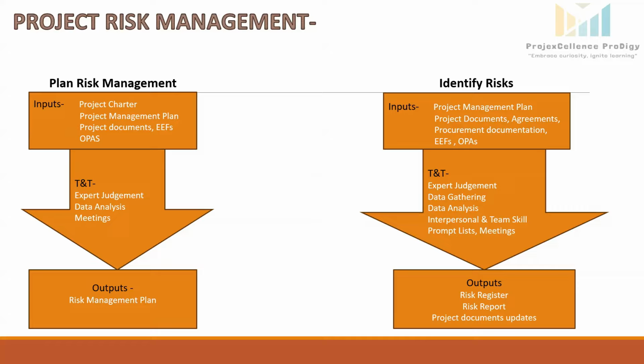Schedule management plan. It identifies uncertainties in the project schedule. For example, weather-related delays in construction or shipment of solar panels could be a risk. Cost management plan we have to refer. So we have to pinpoint the areas of cost uncertainty like fluctuating material prices or unexpected site preparation costs.